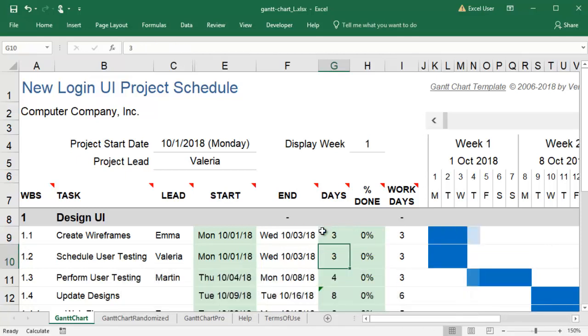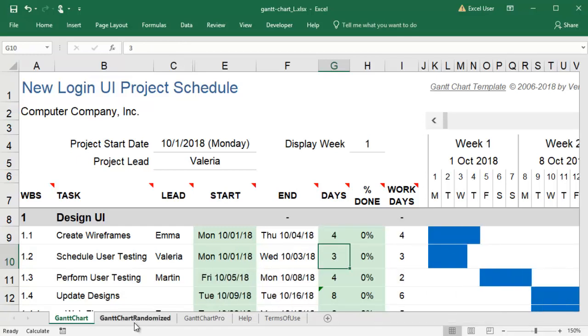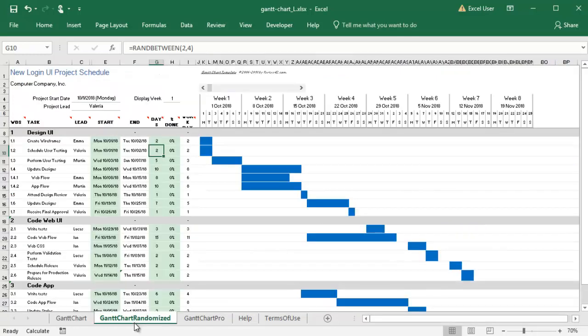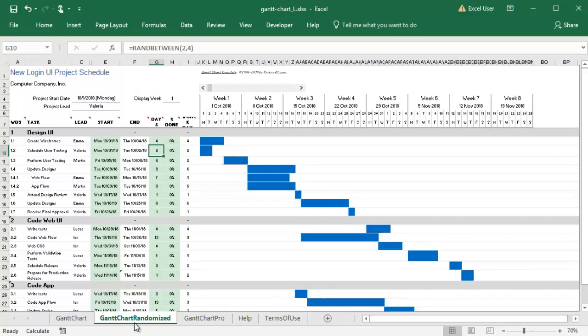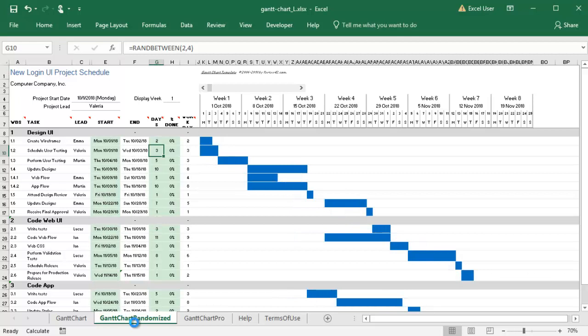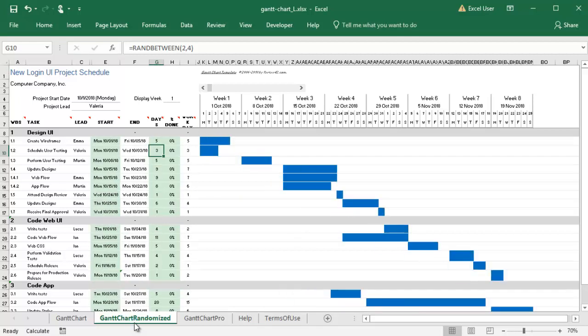I can add Rand Between formulas for each task with an uncertain duration. The values will be re-randomized every time the sheet is recalculated. What I'm really interested in knowing is how all of these different possibilities of timelines will impact my release date.